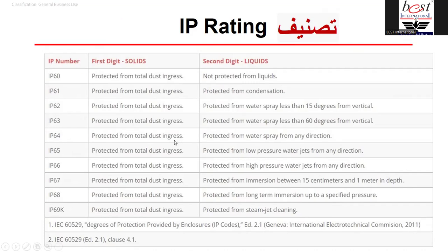you are buying, and that it fulfills your purpose, because especially all these things you have to plan during the design phase. Your BOQ should have all these references proactively. Don't wait until you are going to buy and then start asking, based on which standard, telling Mr. Safety and Mr. Quality Manager how we are going to work. That's important when you just have a business idea in oil and gas, and when you start making drawings. Then you start making the BOQ according to the drawings, as per your business idea. So in the BOQ, give all the references for everything, because you are going to list exactly what you are going to buy to complete your project and have that industry on board.